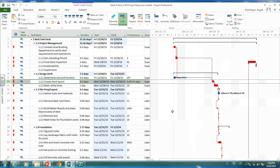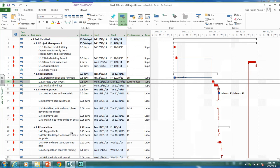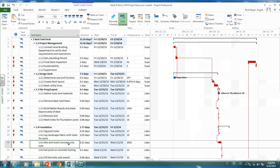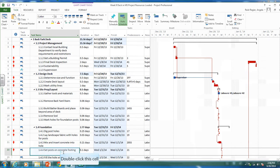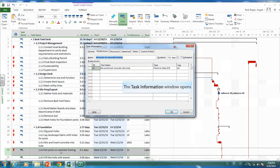That's one place we could use finish to start lags. Another place is once we've poured the concrete, we have to wait for it to cure before we can do anything on it. We'll mix the concrete and the succeeding activity is setting the post on the concrete footing.